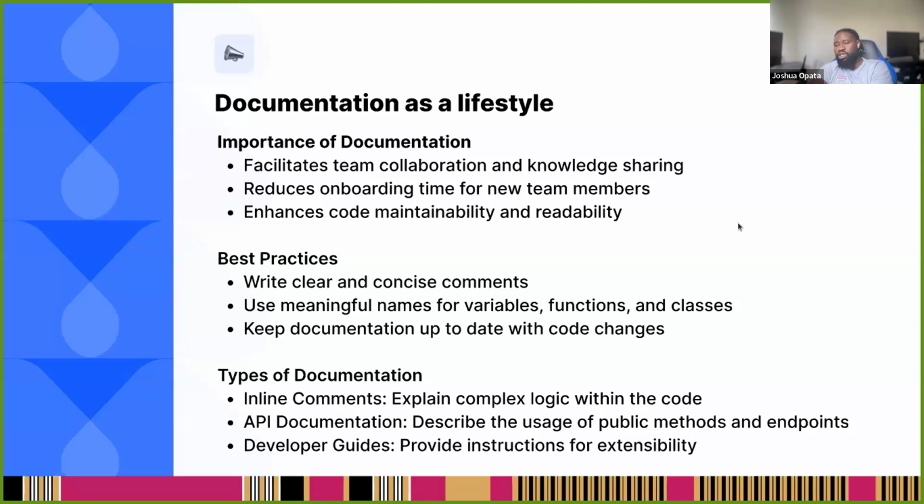huge documentation. What I normally do is I combine drawing platforms like Miro, or even Figma has this board, and I combine those diagrams. So we have the data flow diagrams of this complex logic saved somewhere, then a detailed description of the flow itself on Confluence, and then link that diagram, or even have a snapshot plus the editable link on the Confluence, then link that Confluence link into Jira itself. In that way, even when I am not there, somebody else knows what this whole complex logic is about.